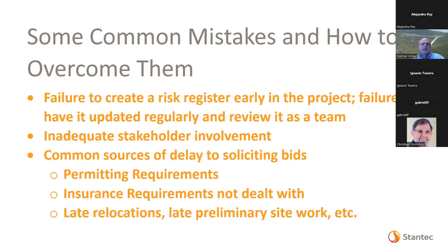I often see permitting requirements, if applicable, insurance requirements, and late relocations. These are very common delays that occur early on in soliciting bids. And of course, time is money. You want to make sure those are addressed early. They're often overlooked as being not that important. We'll deal with that later. No, it'll catch up with you faster than you will know.